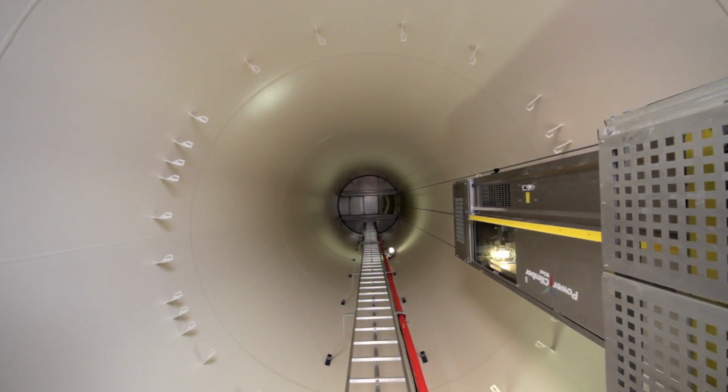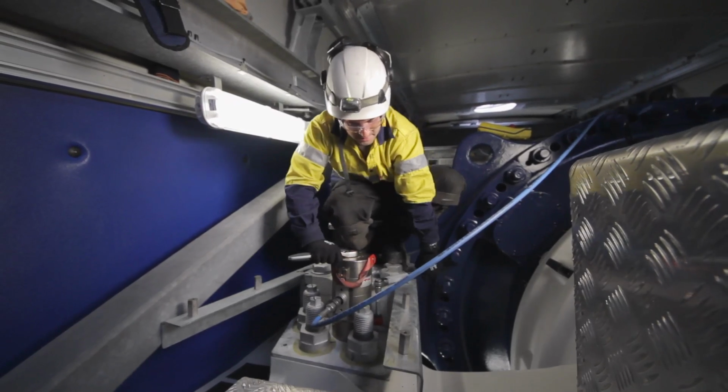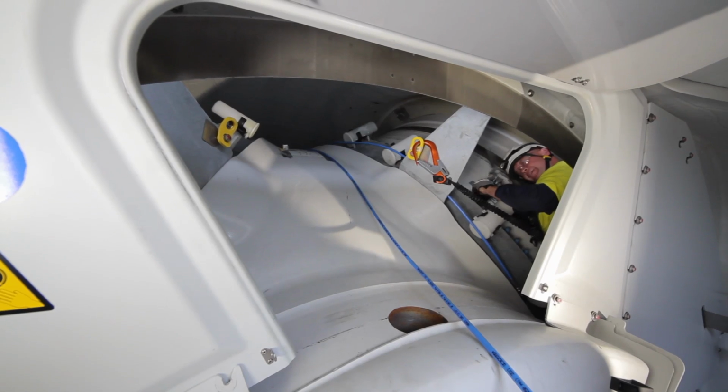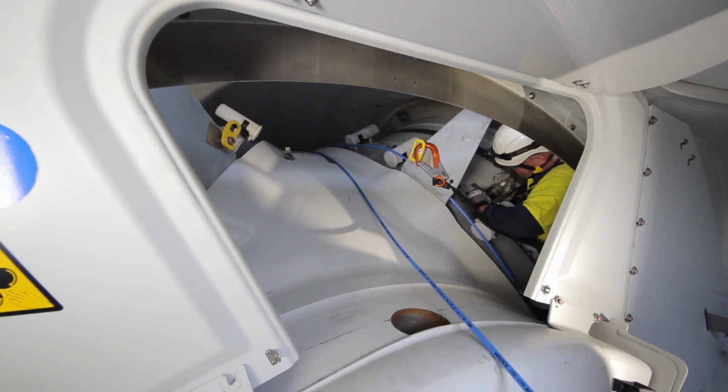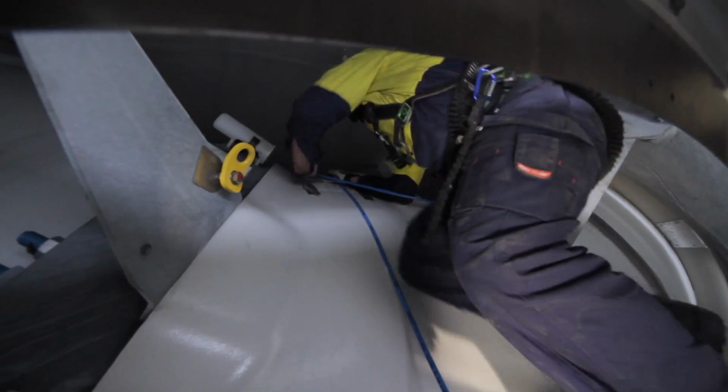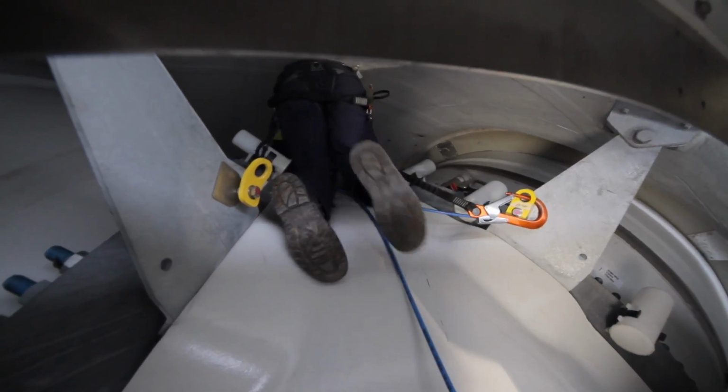Commissioning of Macarthur Wind Farm was scheduled to take place over 7 months. However, a combined acceleration effort by Vestas, supported by Leighton Contractors, reduced this time to 3 months. For AGL and Meridian Energy, this meant completion of the project was almost 4 months earlier than the contracted date.